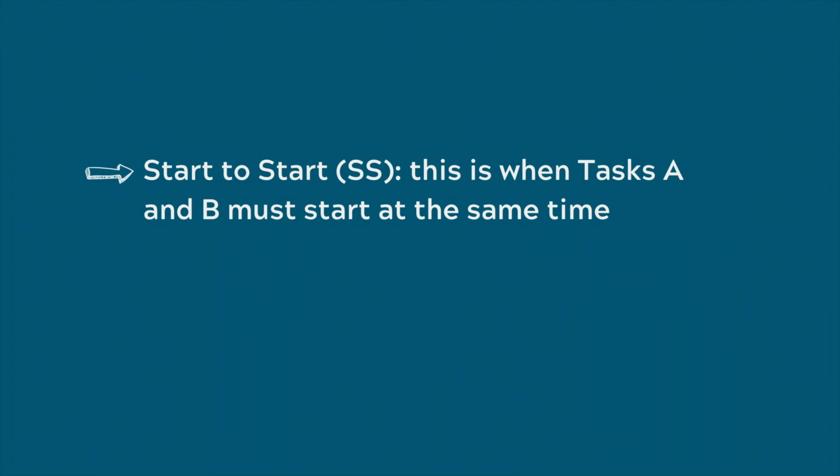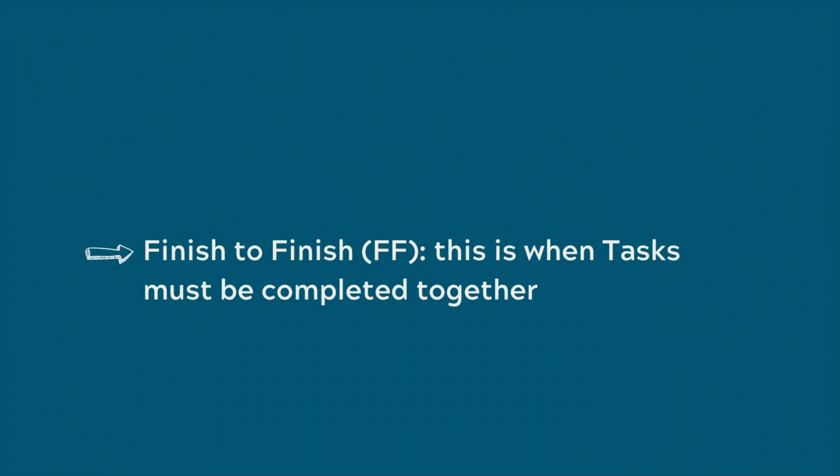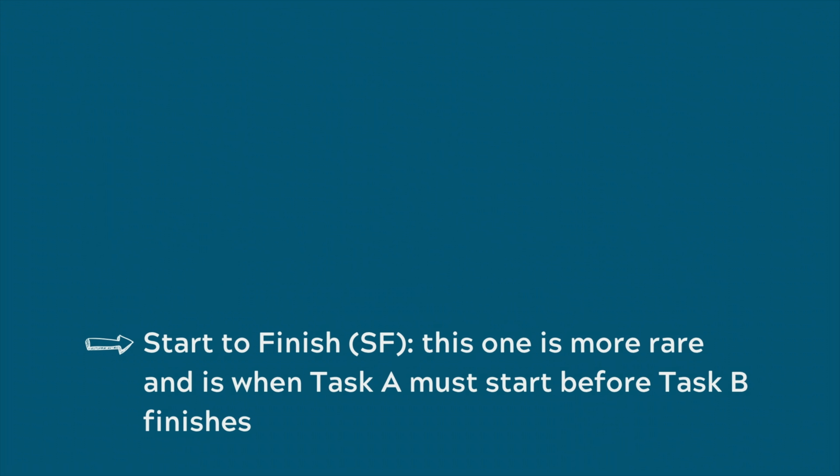Start to start. This is when tasks A and B must start at the same time. Finish to finish. This is when tasks must be completed together. And start to finish. This one is more rare and is when task A must start before task B finishes.